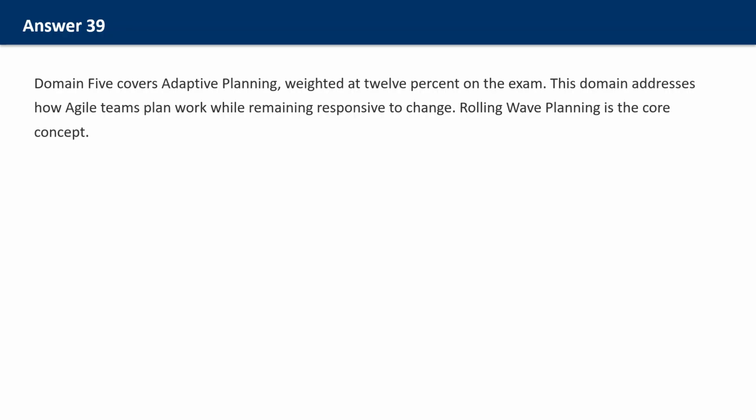Why this approach? Because planning accuracy degrades with time. This phenomenon is called the cone of uncertainty. At the beginning of a project, our understanding is limited. Estimates might be off by a factor of 4 or more. As we progress and learn, uncertainty narrows. By the time we're executing work, our estimates are much more reliable.